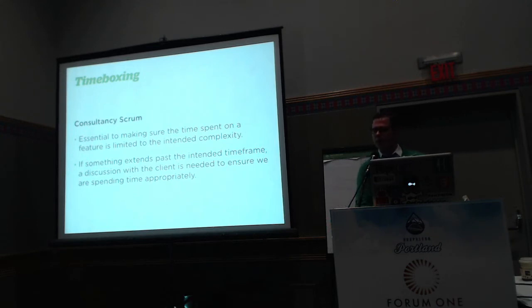We have to have a conversation with them at that moment to say, all right, we're not going to be able to achieve all of the stories in the sprint that we had set out to because this is taking longer than we thought. This 2-point story is now more like a 5-point story. So what are we going to take out in order to finish this, or do we stop it right now? And you have to have that conversation with the client on a regular basis.